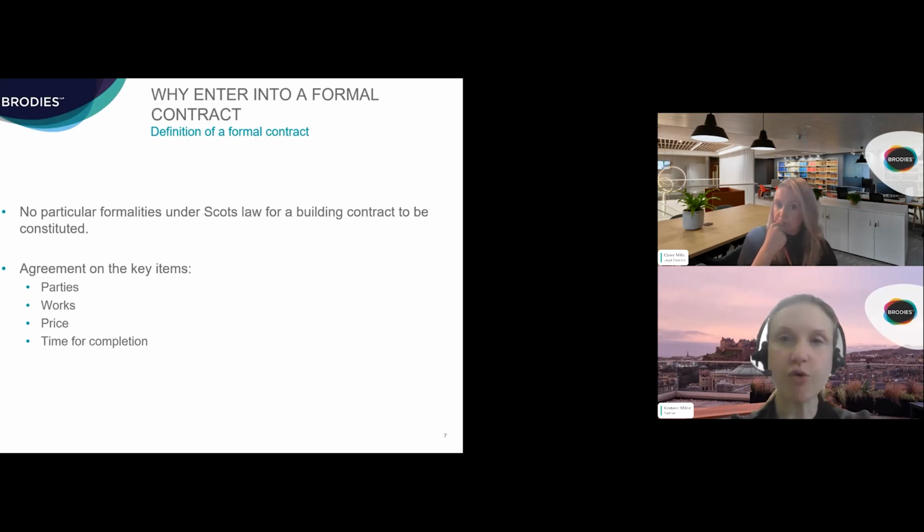When I refer to a formal contract, I'm really speaking about the next step of, for example, completing an SBCC form. Other forms of contract are available, with details of the parties, contract sums, date for completion, any liquidated damages, etc., annexing your schedule of amendments and the technical documentation, all to form one contract. So why do we recommend that step? There are a few reasons.